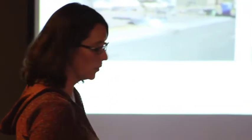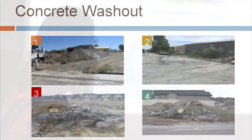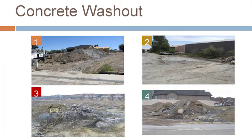If you have other paints or chemicals, paint thinners, stuff like that, that are going to be stored outside, exposed to stormwater, they also need to be in some sort of secondary containment so that if they get punctured, they don't spill all over and run into the storm drains or off your site. Those pollutants are regulated. This is the biggest one, I think, that has lots of issues.